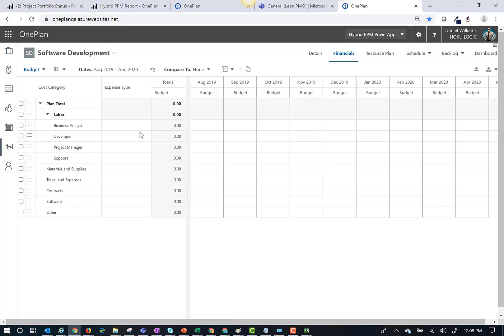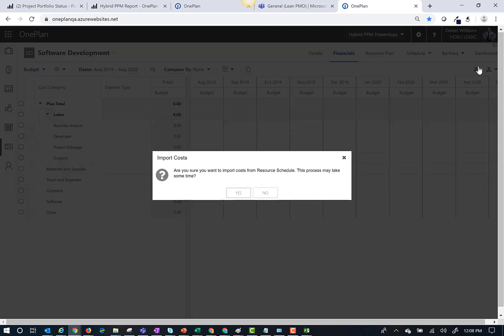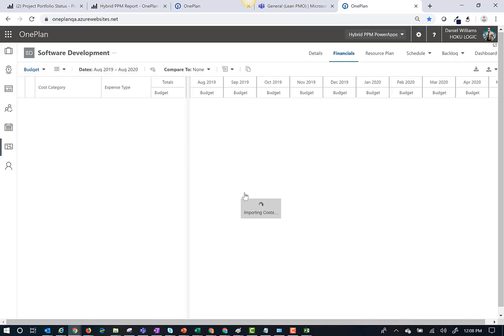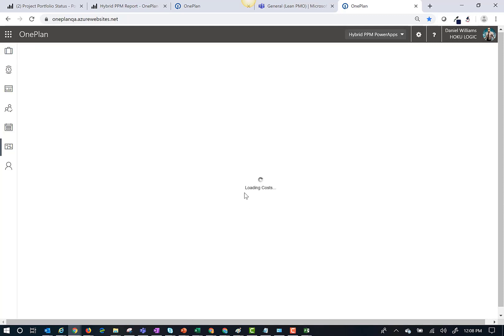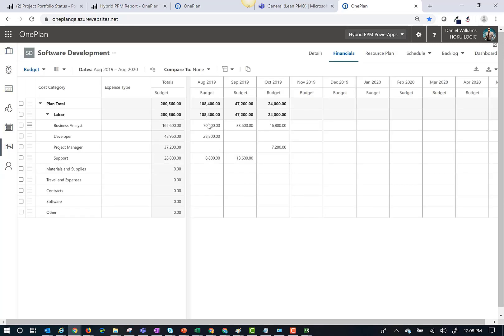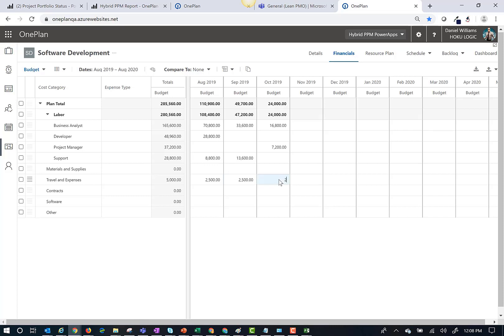If I'm using OnePlan for financial management, I can also import my Microsoft Project Plan labor cost into my financial plan. Click on the Financial tab and click Import. Once I have imported my role-based financials from Microsoft Project, I can now manually enter non-labor cost.